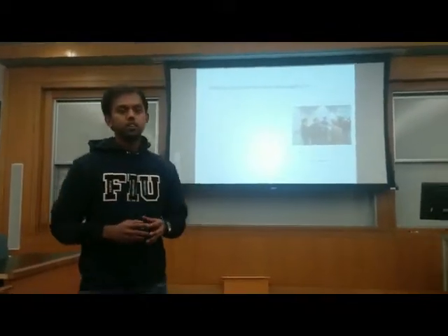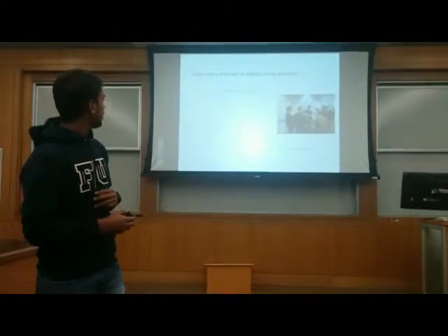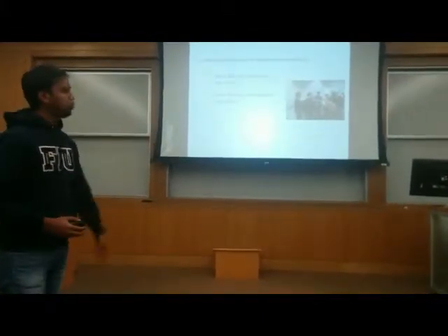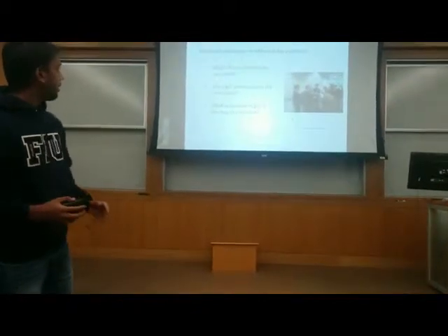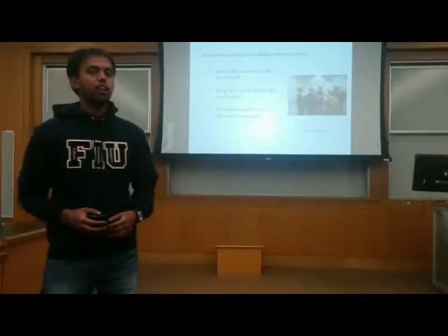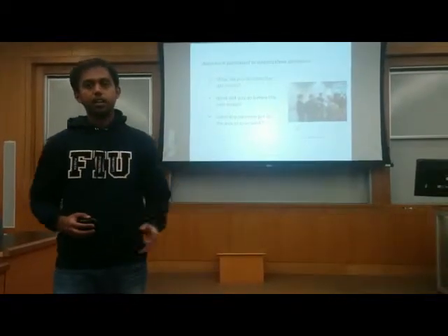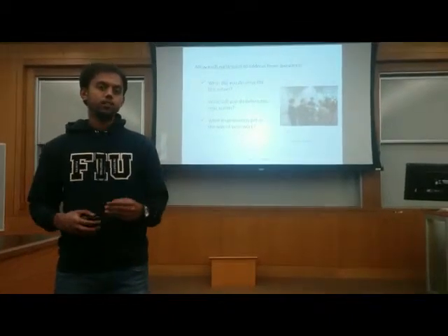In the daily Scrum meetings, there are three main questions to be addressed. The first one being, what did you do since the last Scrum? What will you do before the next Scrum? And what impediments got in the way of your work? Each and every team member has to address these three questions during every daily Scrum meeting.